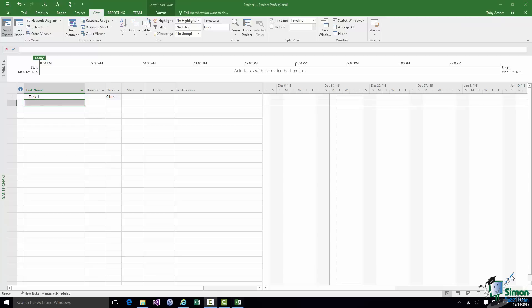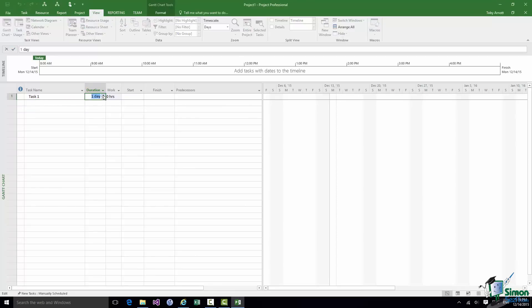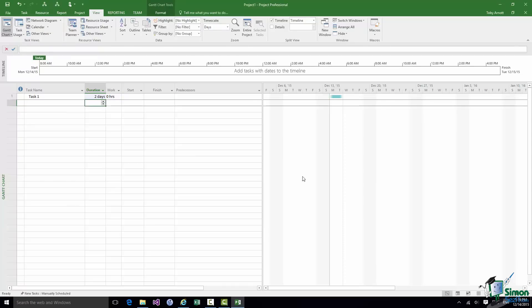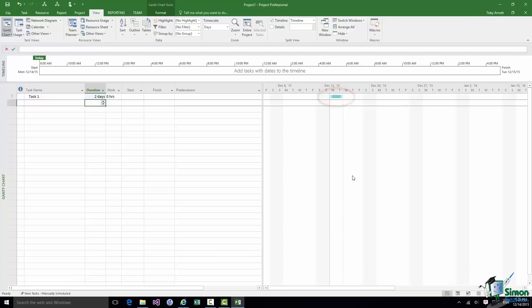Now just to give you a little bit more of an idea of how that's going to look let's go back to that first task, Task 1. I'm going to click in the Duration column there in line with Task 1. And I'm going to say that this is a two day task. Click elsewhere. And there is my Gantt bar for a two day task. Now there are various things about that bar in terms of its color, its ends, and so on that each have significance. And we're going to talk about those later on. But basically as we start to build up a schedule we'll build up entries in the table on the left and each of those will be represented by a Gantt bar or other appropriate symbol in the chart on the right.